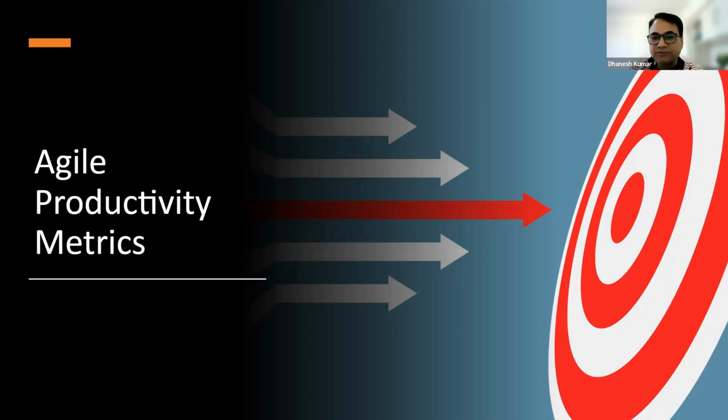Okay, there is another wonderful question from Alex about cognitive load. I would just go back to one single metric that could help us analyze this and make data-driven decisions, which is work in progress. The moment you understand your capacity, what you can do, you work accordingly across all the work you have to do. One of the things that happens is that a lot of the work done by the team does not get represented on their board, or they are not tracking it. Hence, they really don't understand what is going on and how their time is going into different buckets.